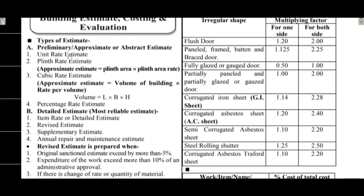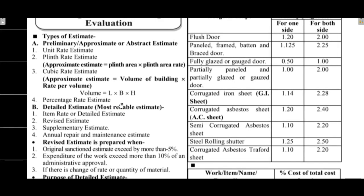The preliminary, approximate or abstract estimate methods include unit rate method, plinth rate estimate - the plinth rate is multiplied by plinth area. Next is the cubic rate method based on volume of the building. Then percentage rate estimate. These are the preliminary methods.